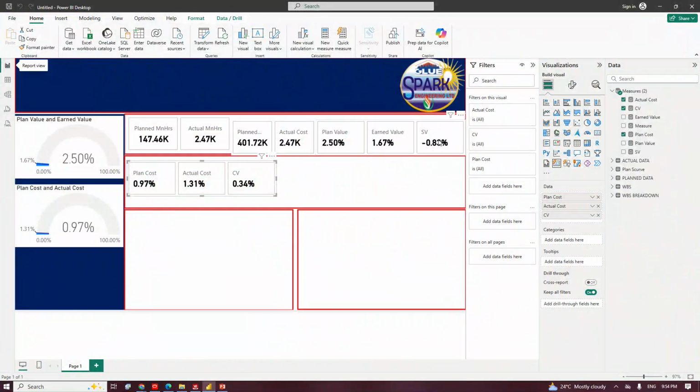Now for the variance, you just subtract and it gives you the variance. This chart also indicates the same. Look at where we are, but look at where we plan to be. You can use colors to differentiate it. This is where we are and look at where we plan to be. This one, we are ahead. You can see that the blue line is ahead of the dark light blue, right? So this is how it interprets how we are doing.